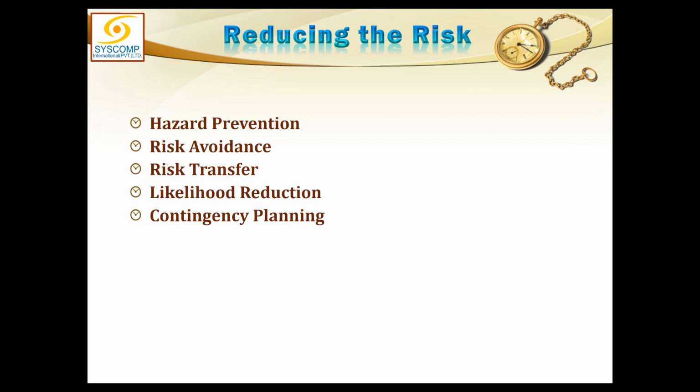So I said one way of doing it is to reduce the likelihood, and the other is to reduce the amount at stake. If I am sitting in a room and it has a likelihood of 10% that it will catch fire, and if it catches fire, it will cause damage of 10 lakh rupees, then either I can work towards reducing the chances of this room catching fire, or I could remove the expensive combustible items from this room.